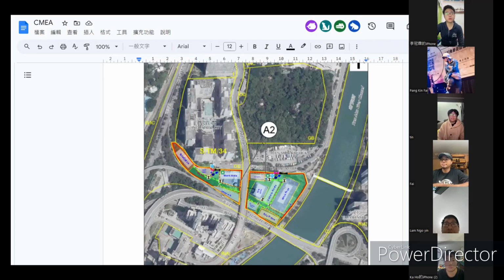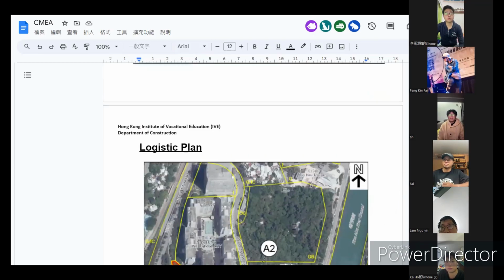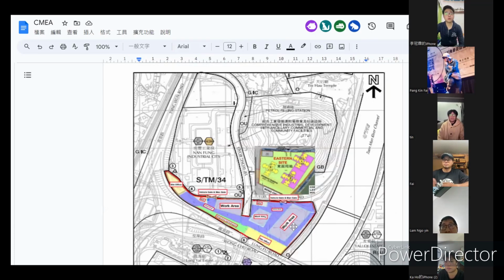The advantages of our site layout are multiple. By positioning the storage and handling area away from the public, we minimize noise and dust pollution, contributing to better environmental control. The centralized steel bending yards reduce the handling of material and decrease the likelihood of damage or delays.